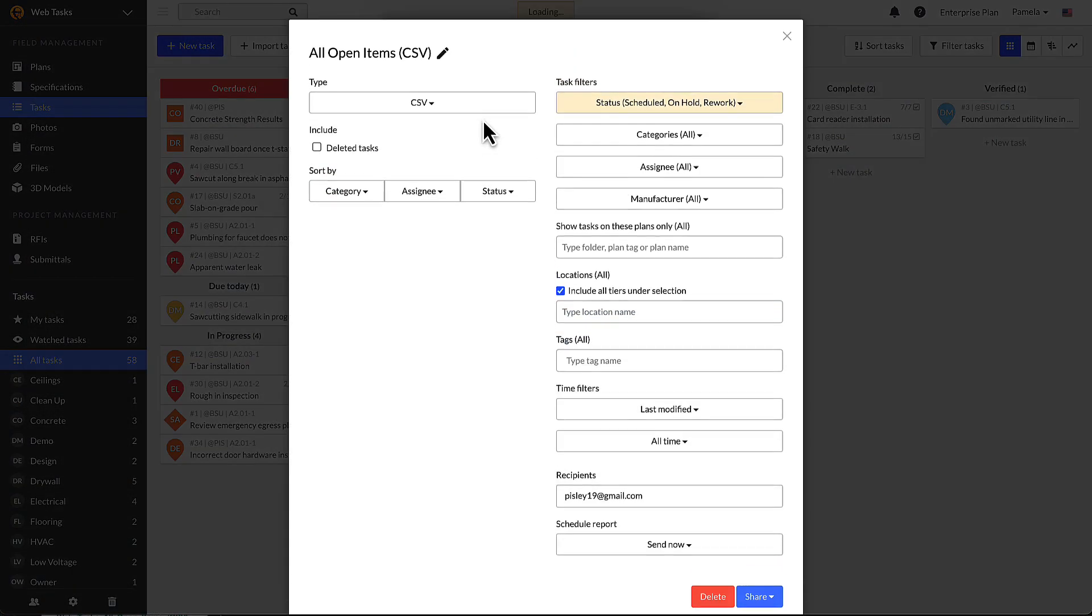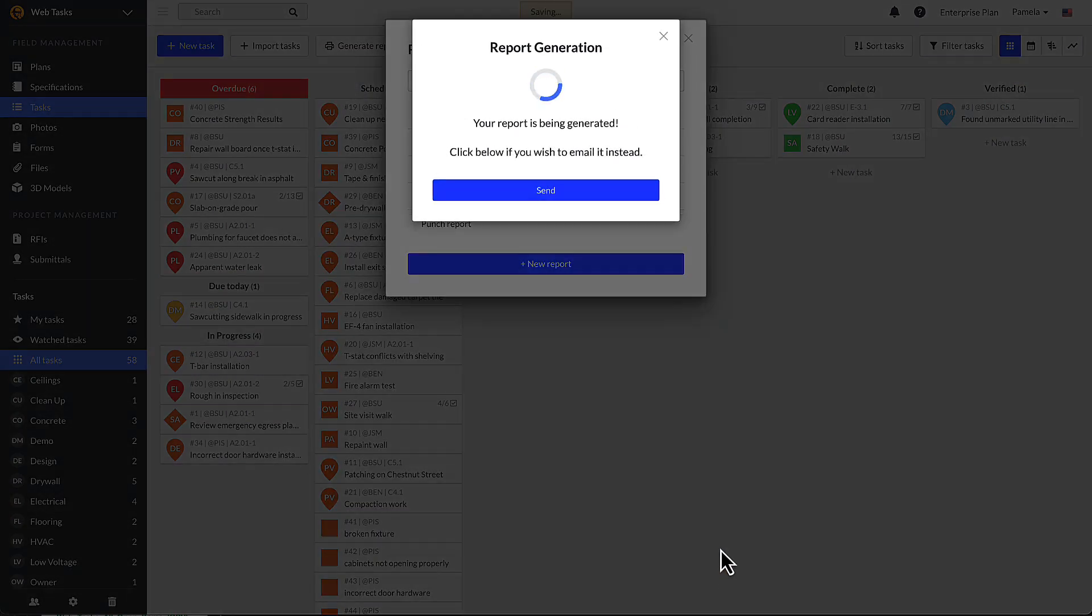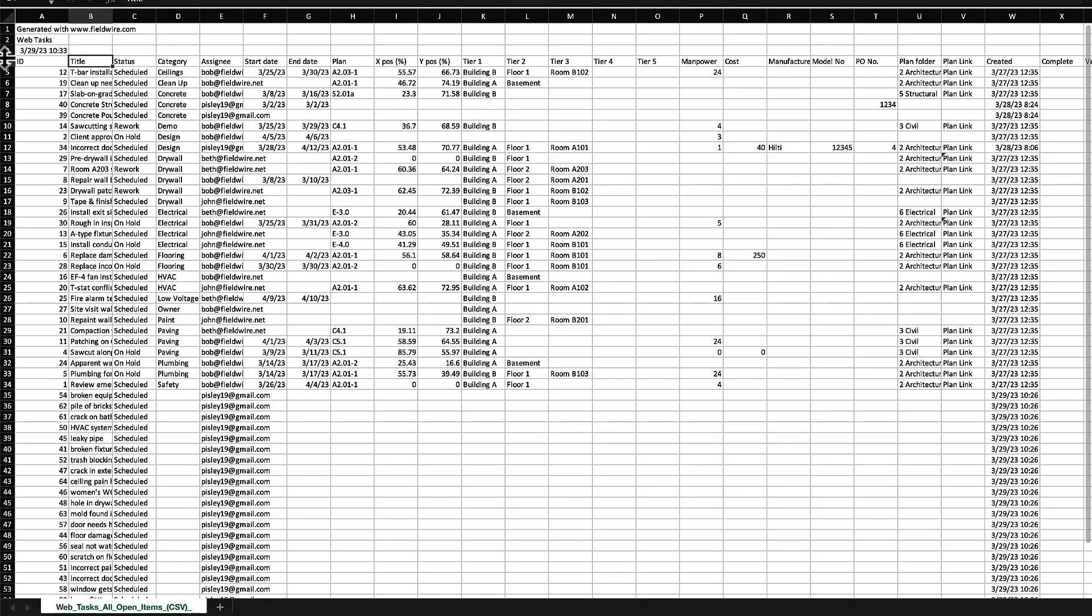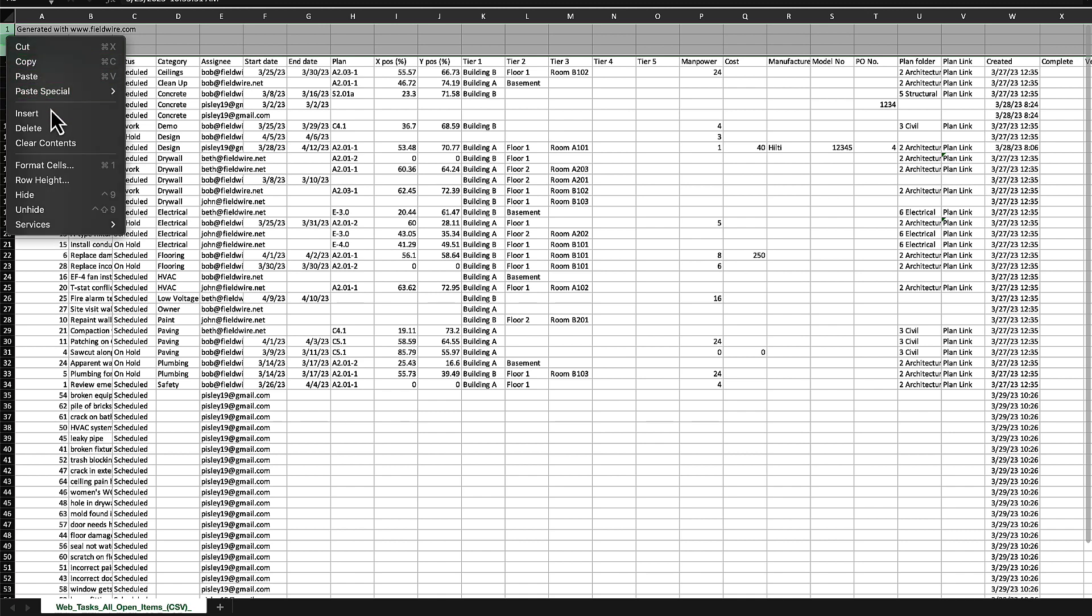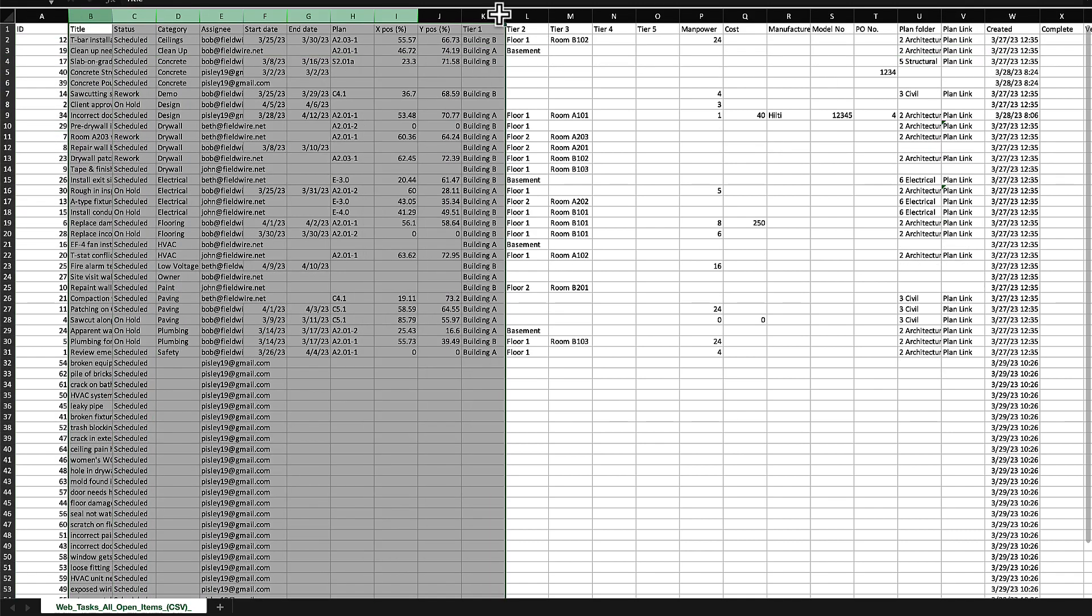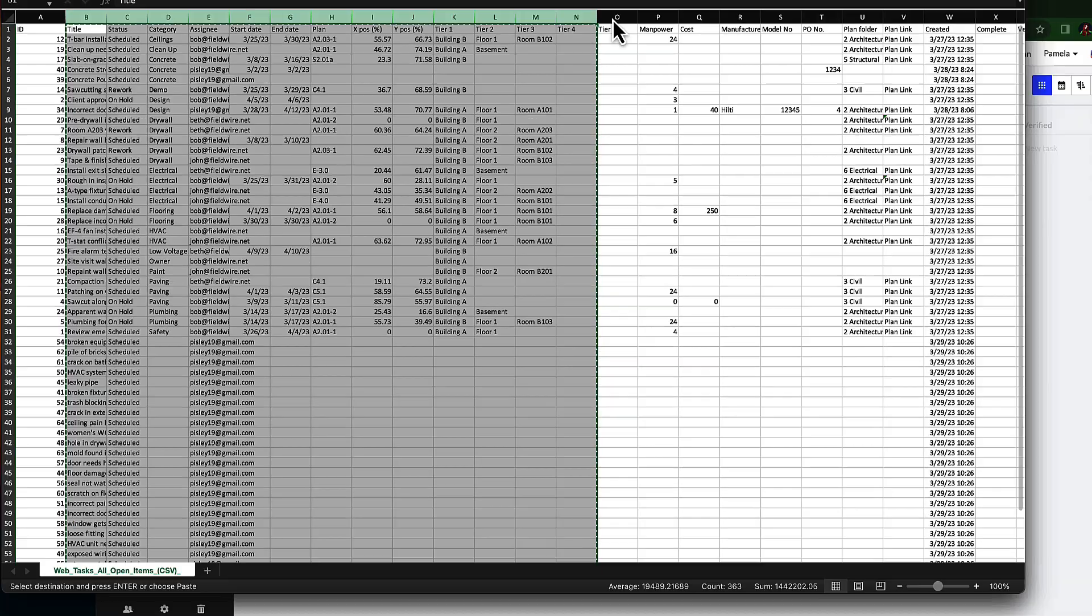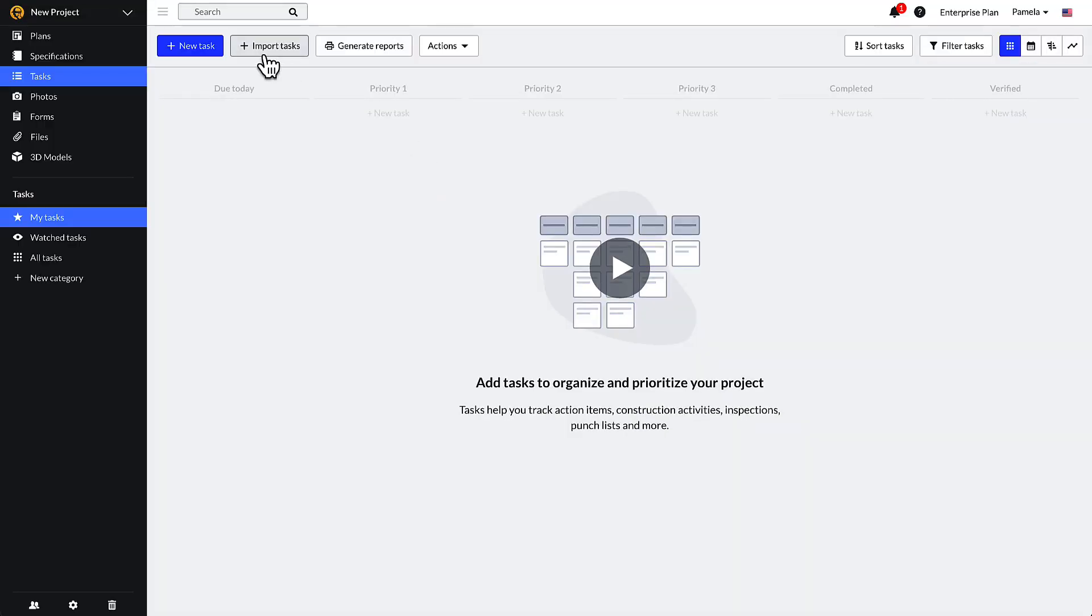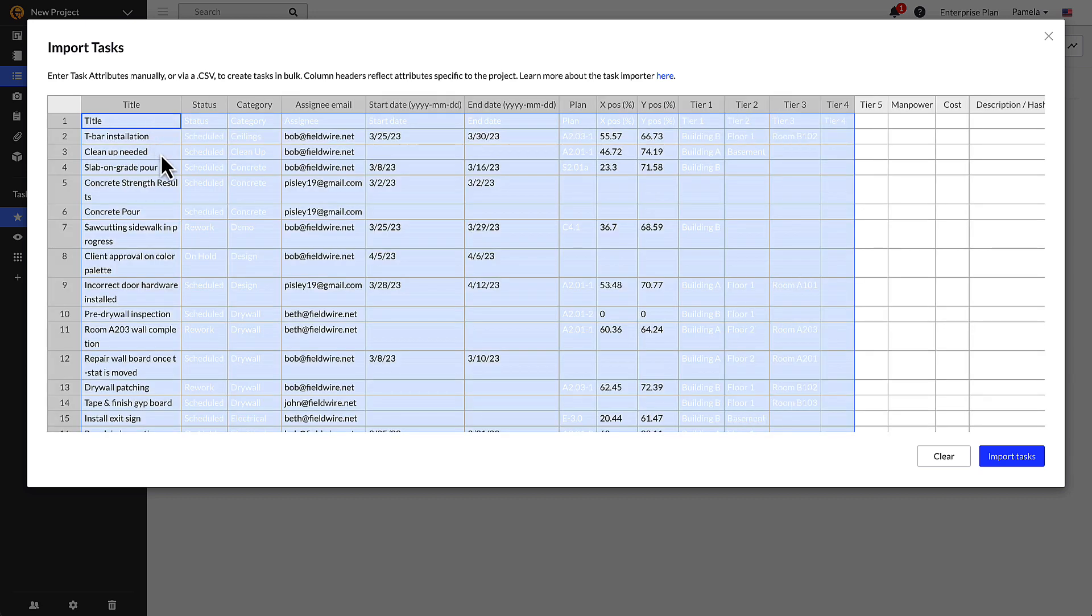The task importer is structured similarly to Fieldwire's CSV reports. So if you generate a CSV report of your tasks from an existing project, you can easily manipulate the spreadsheet so that the column headers match the task importer spreadsheet, and you can copy-paste it directly into the task importer on your new project. This is a convenient way to recreate a set of standard tasks from an existing project to any new project.